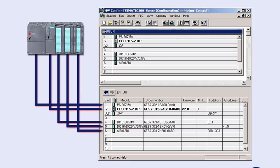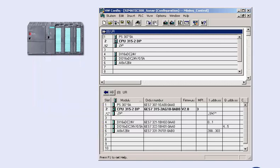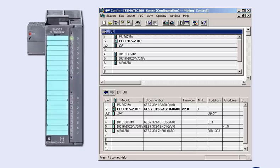For commissioning the user program later on, it is absolutely necessary that the signal path, for example from the encoder to the CPU, corresponds to the wiring plans. Wiring and signal testing for the process I/O is performed now, unless already done during installation of the machine or plant. The hardware configuration editor provides you with the easily operable signal test function, which you can also use without user program.